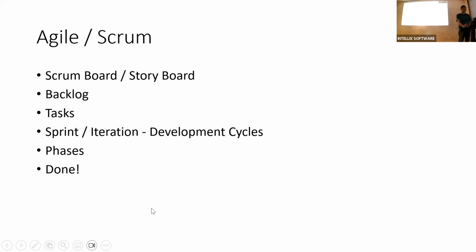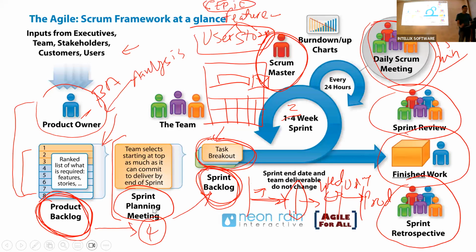This is very important. When we say a story is complete, we implement it fully, right? Everybody has their own definition of done, depending on how they want to say a sprint is done. A lot of companies say, okay, when the UAT is done, we will call it done. We will not deploy to production. We'll wait for a future date and deploy all the work together, instead of deploying every week.